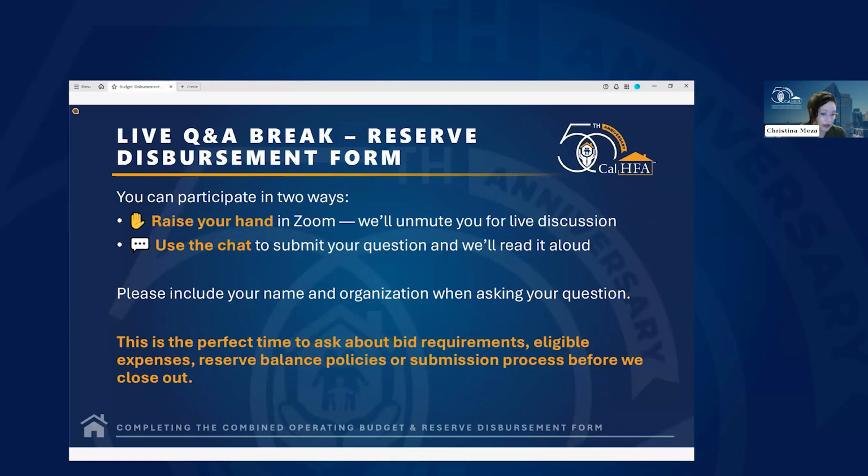If we hold the funds, we automatically have the final approval. If, say, the borrower or another lender holds the funds, if you submit their approval, you would still need to submit our form so we can have it for our files and we would move forward with the approval.